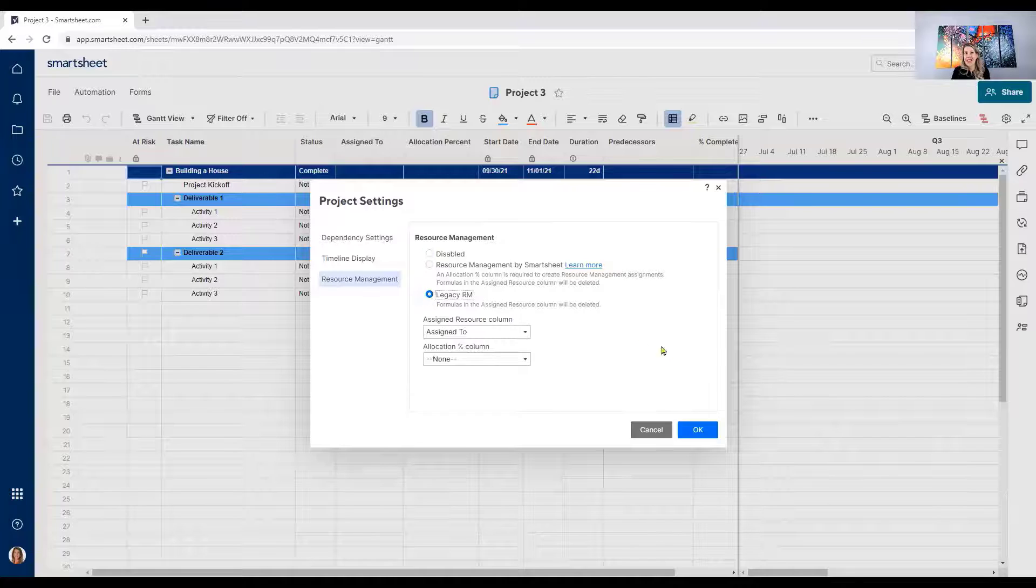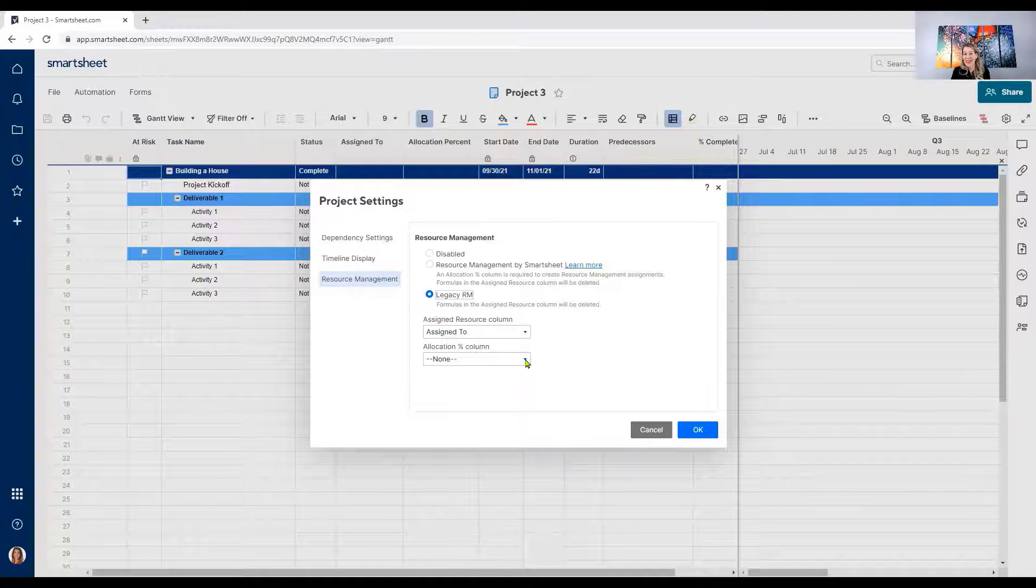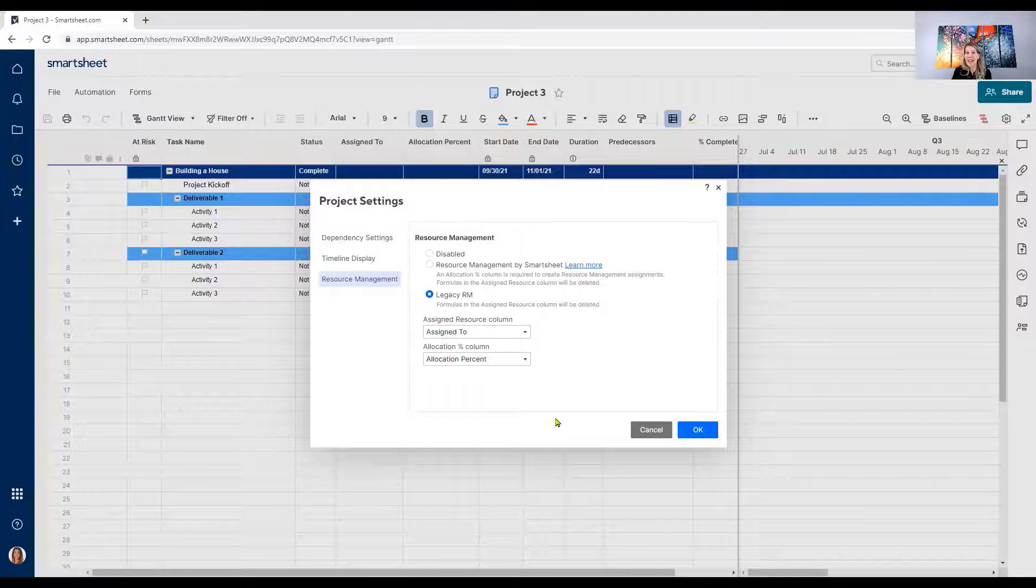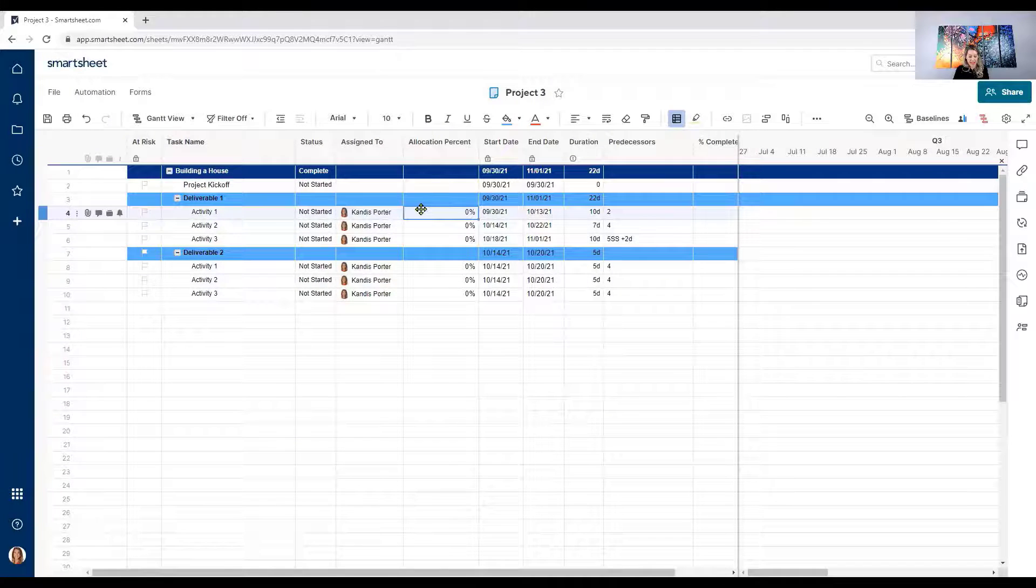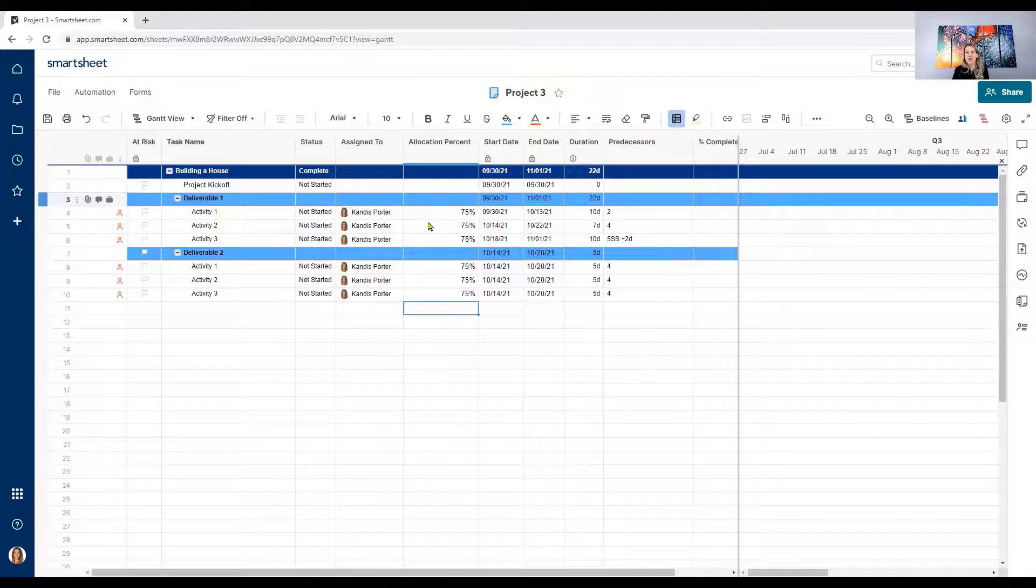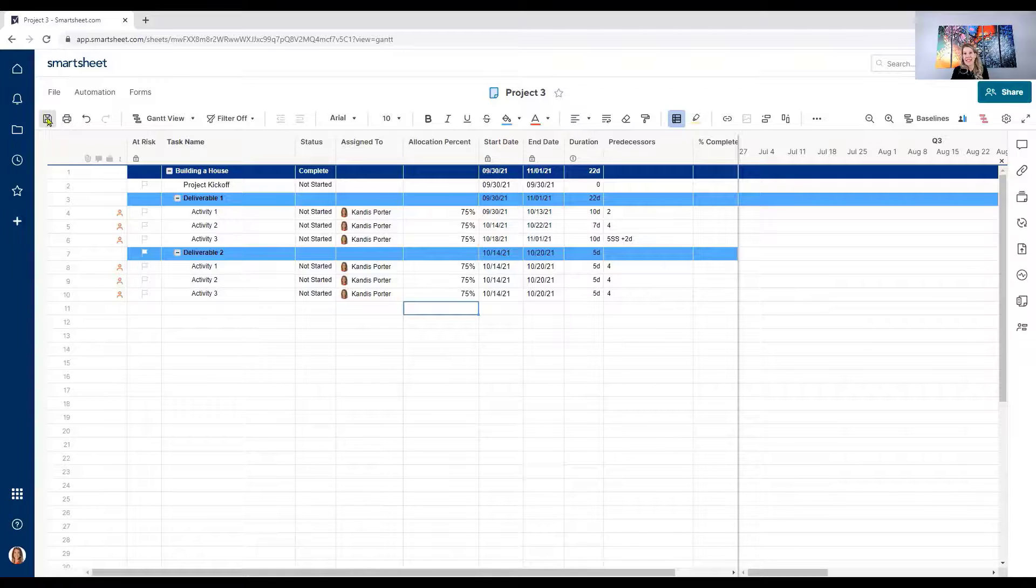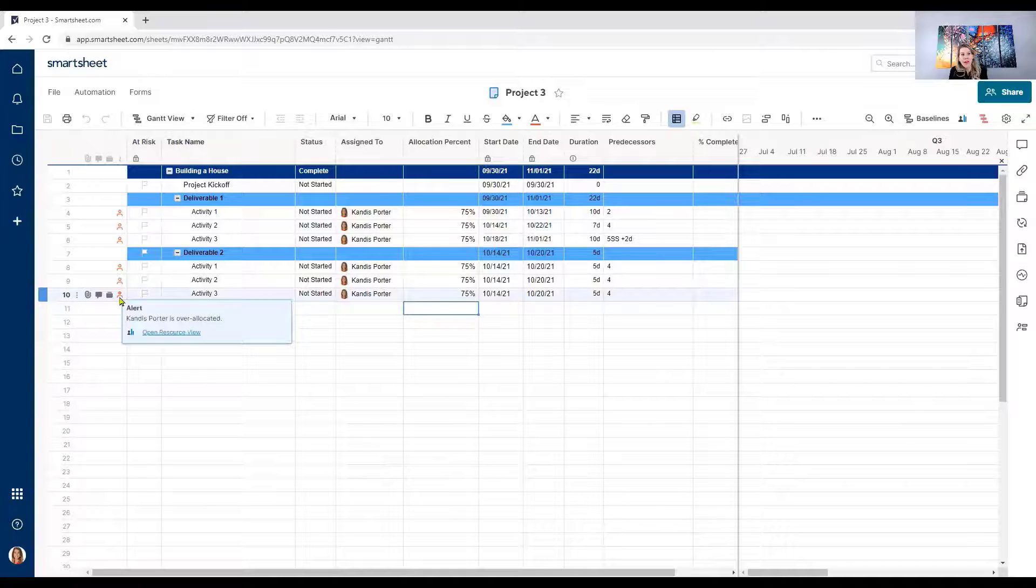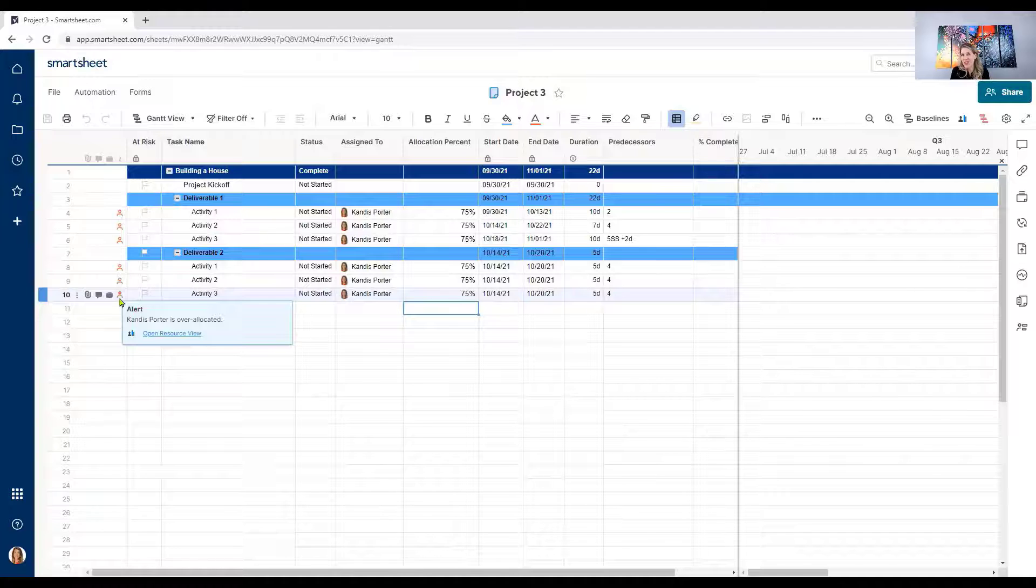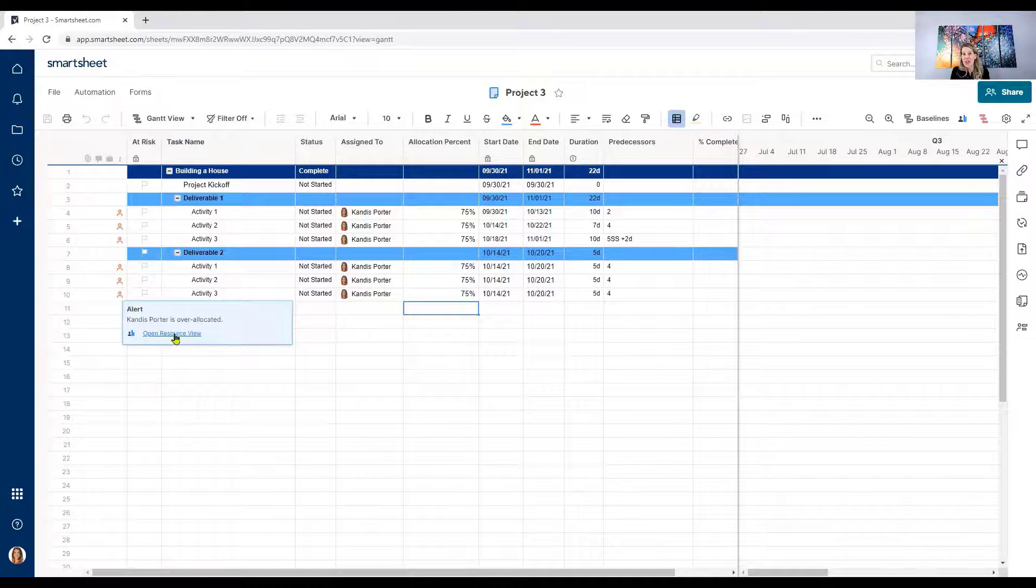So let's turn this on again, legacy resource management. Again, my resource is in the assigned to column. My allocation percent column is where I'm going to put the percent that Candace has allocated to this project. I'm going to click OK on that and let's say I want to put Candace on at 75 percent for this project all the way down. I'm going to enter 75 percent on everything she's assigned to. That means she's going to work 30 hours a week on this project. 75 percent. I'm going to click save here and look at that. A little bright red person showed up on the left hand side. If you're familiar with MS Project, it gives you a similar warning and it says alert. Candace Porter is over allocated. Open resource view.